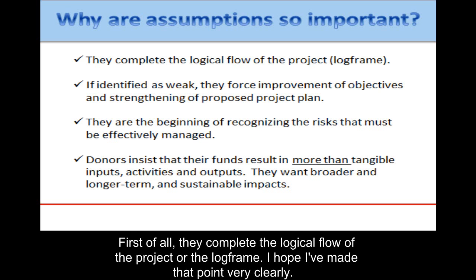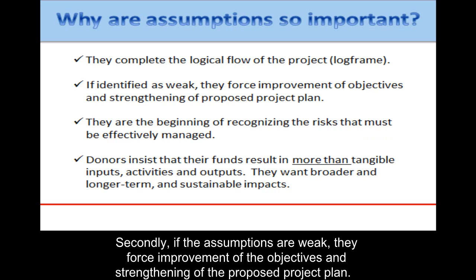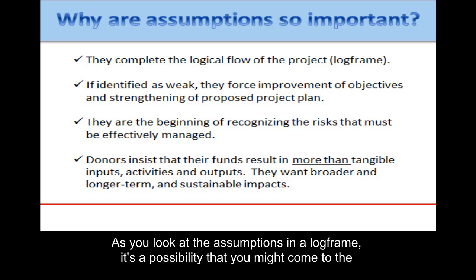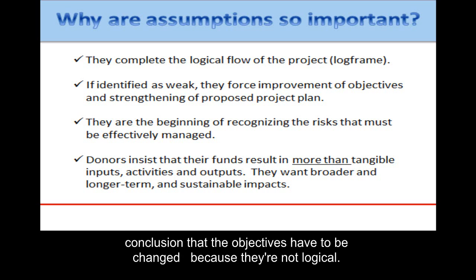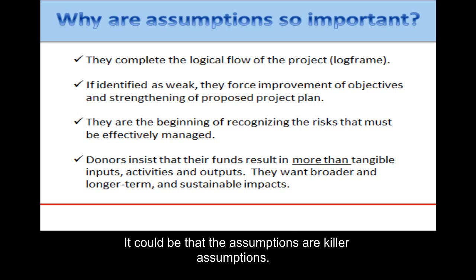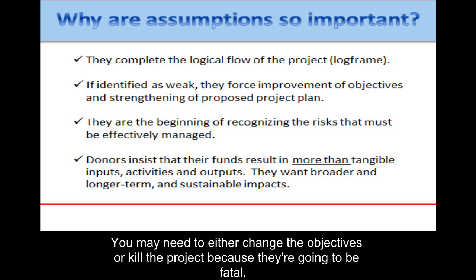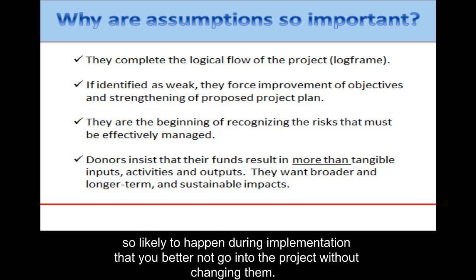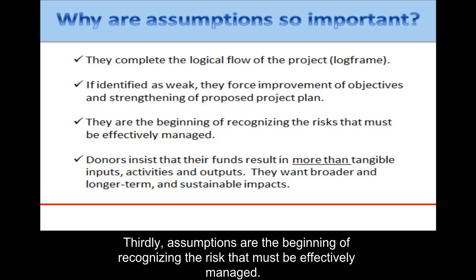First of all, they complete the logical flow of the project or the log frame. I hope I've made that point very clearly. Secondly, if the assumptions are weak, they force the improvement of the objectives and strengthening of the proposed project plan. So as you look at the assumptions in a log frame, it's a possibility that you might come to the conclusion that the objectives have to be changed because they're not logical, or because the assumptions that you came up with are killer assumptions, and you may need to either change the objectives or kill the project because they're going to be fatal, so likely to happen during the implementation that you better not go into the project without changing them. Thirdly, assumptions are the beginning of recognizing the risk that must be effectively managed.